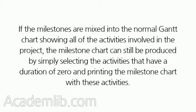If the milestones are mixed into the normal Gantt chart showing all of the activities involved in the project, the milestone chart can still be produced by simply selecting the activities that have a duration of zero and printing the milestone chart with these activities.